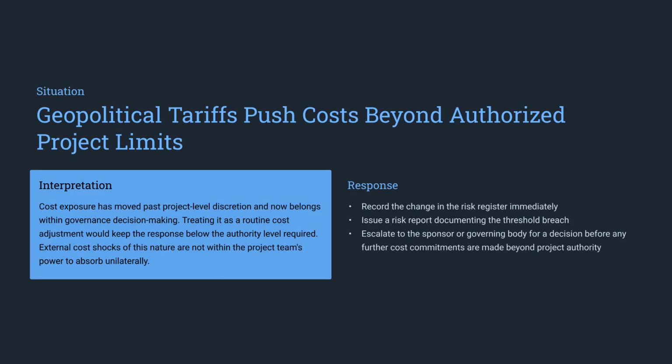Similarly, if geopolitical tariffs push costs beyond authorized limits, the project team must document the breach and escalate the situation to the governing body for a decision before making further commitments.